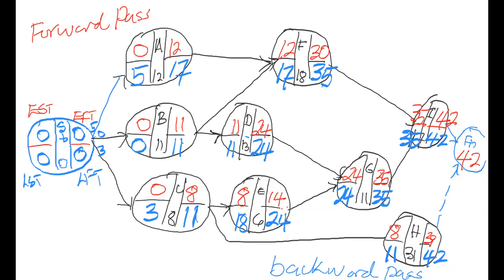All right, now, to find the slack time, it is either the late finish minus the early finish, or the late start minus the early start. So it's one or the other. Both of them must give you the same information. So if your friend is using one and you're using the other, you should get the same value in terms of the slack. If you get different information, somebody's network has an error in it, all right? So now we're going to calculate the slack.